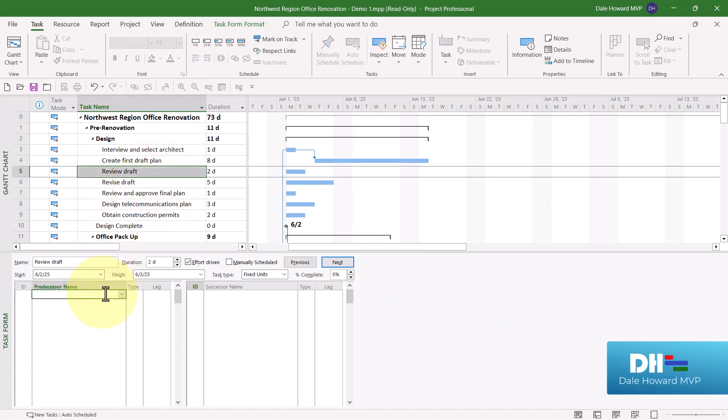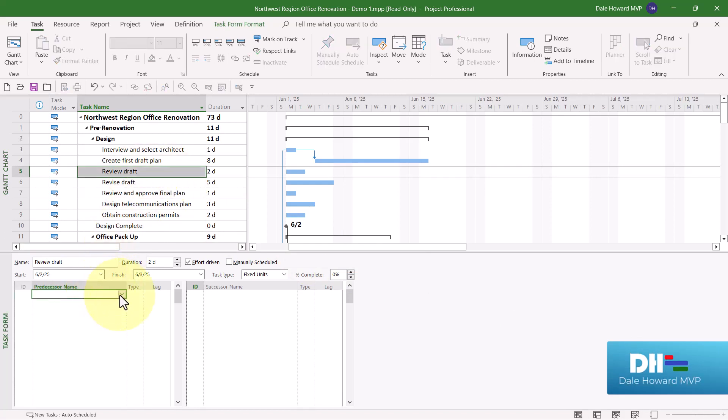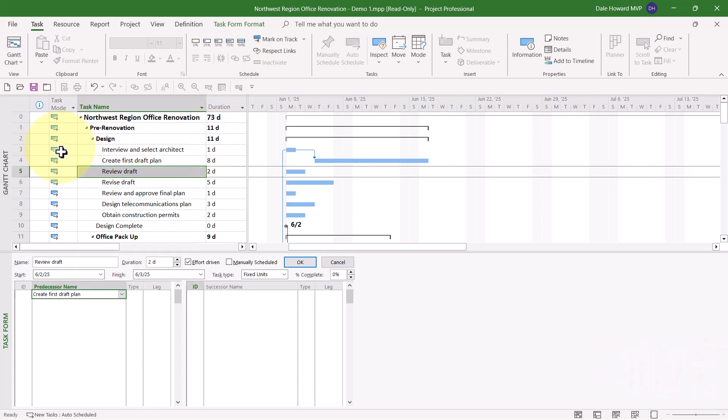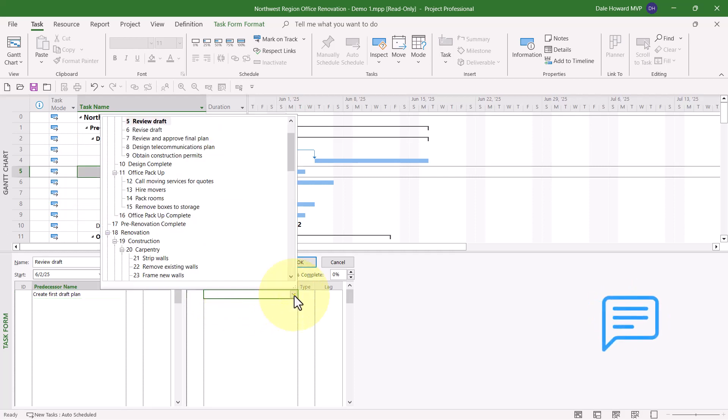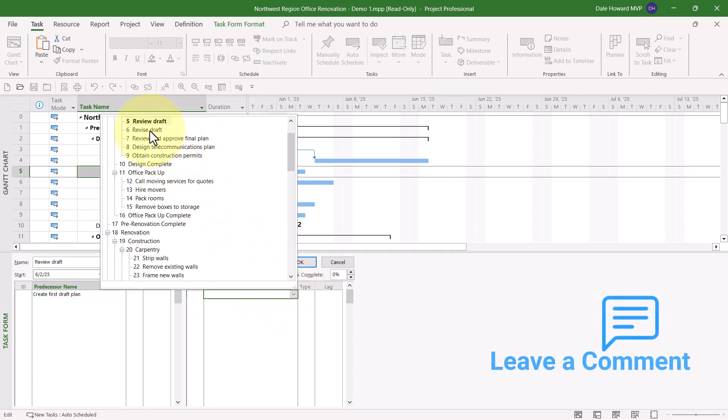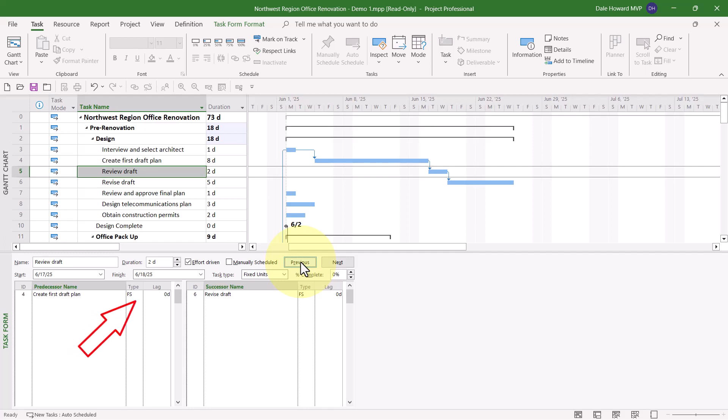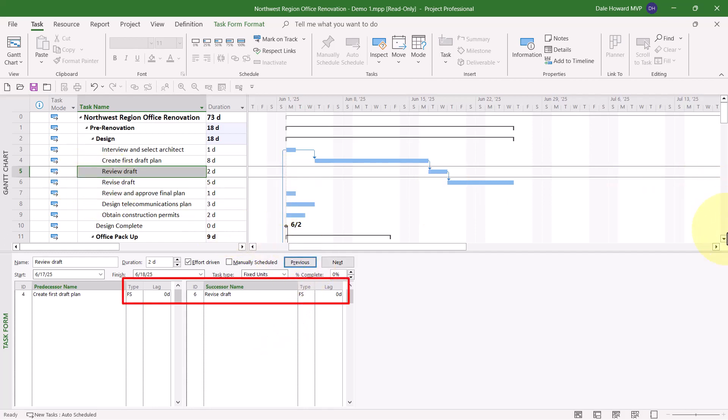The Predecessor for this task is number four. So let's scroll up. Select number four. Its successor is number six. So let's select number six. And I'll click OK. If you do not specify a type value or lag value for either the predecessor or the successor, Microsoft Project will automatically set the dependency as Finish to Start with zero days of lag.